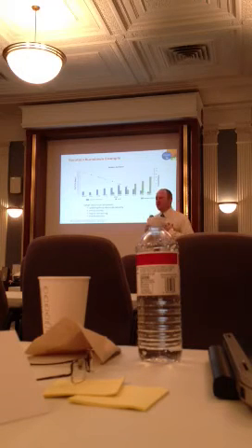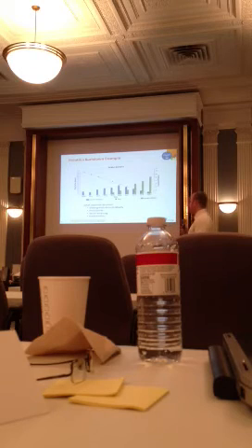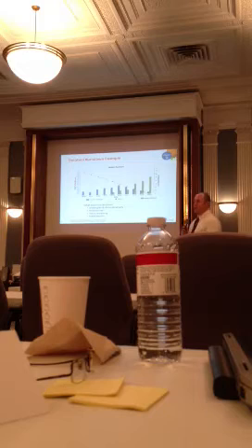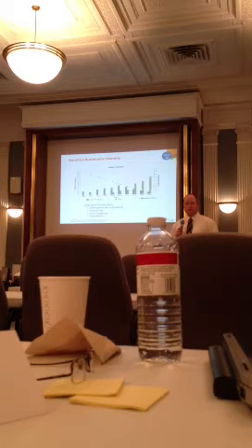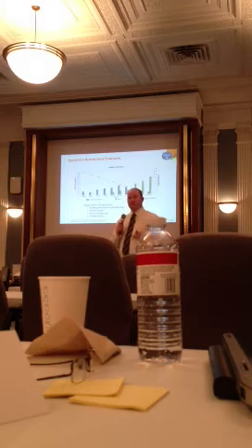So I would say that I'm delivering work iteratively here. I'm delivering my scope iteratively because I'm getting a little bit of acceptance every single day. If this was waterfall, you'd have no acceptance, no acceptance, no acceptance, boom, a ton of acceptance. Right? And all of your acceptance would be happening at the very end. If you're delivering iteratively, you're getting a little bit of acceptance every single day.